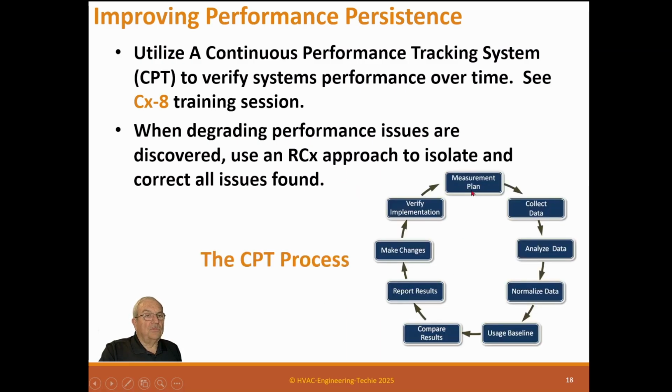And what you do is you do have a measurement plan. You collect the data from your systems. You analyze the data. You normalize the data. There's certain normalizations. And you look for usage baselines if you're using that. And then you compare results to past results. And then you report the results to everybody. Then you make changes that you discovered over here. You make changes, and you verify to implement the changes, then it starts over. And this happens every month.